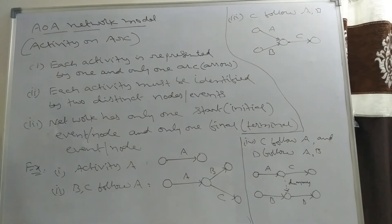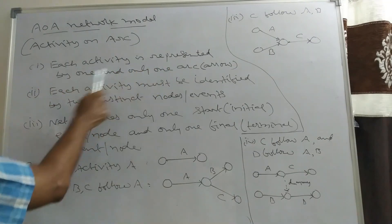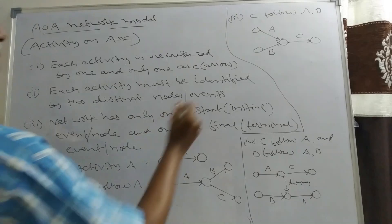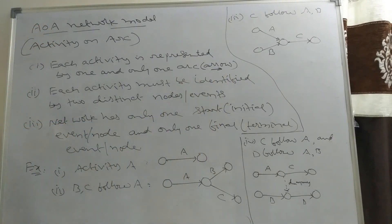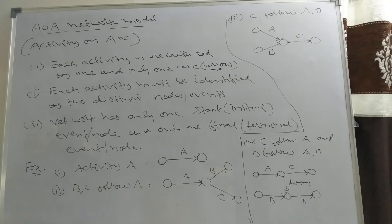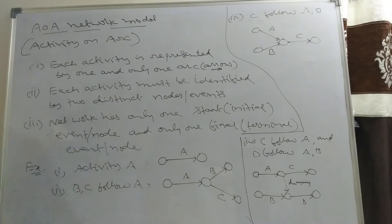These are the rules to follow in constructing an AOA network. Rule 1: Each activity is represented by one and only one arc or arrow. Rule 2: Each activity must be identified by two distinct nodes or events. Rule 3: The network has only one start event (initial node) and only one final event (terminal node).